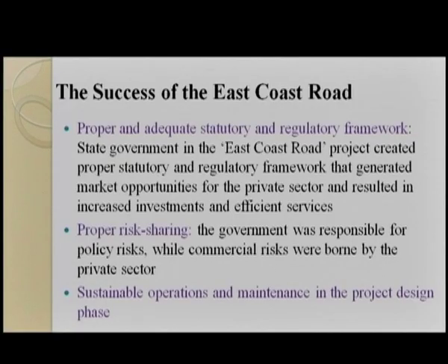The success of the East Coast Road depends on some key points. Proper and adequate statutory and regulatory framework: the state government in the East Coast Road project created a proper statutory and regulatory framework that generated market opportunities for the private sector and resulted in increased investment and efficient services. Proper risk sharing: the government was responsible for policy risk, while commercial risks were borne by the private sector.